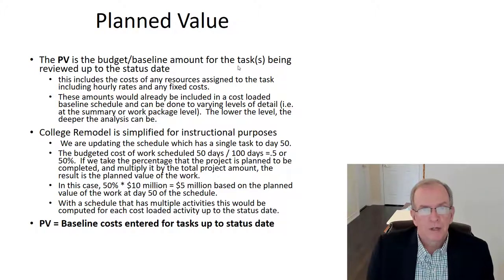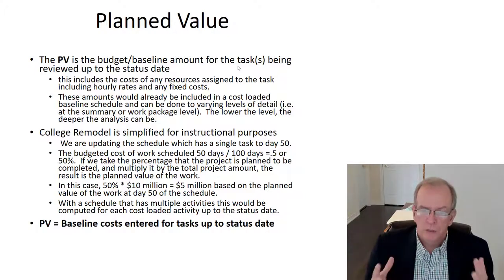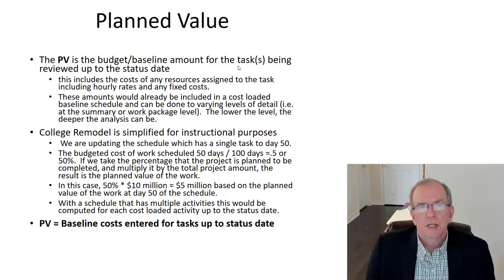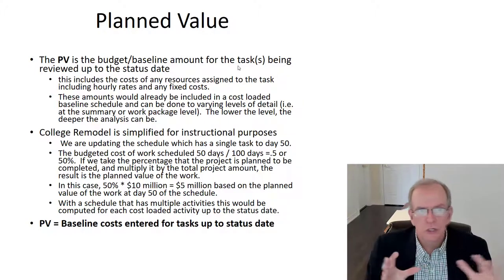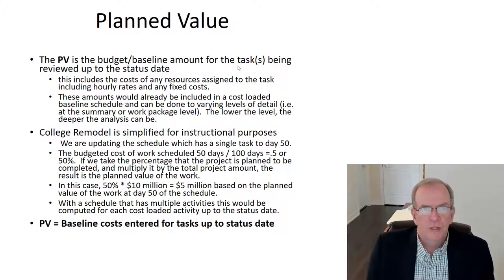Very often it is a contract requirement. And as I said in the previous video, you'll typically find these types of projects when you're looking at infrastructure projects or heavy industrial projects. It's the norm. If you're looking at commercial projects and residential projects, it is not the norm. So there's that difference in where construction uses it. If you're in low-rise residential, you're not going to be seeing this. If you are building transportation systems or hydroelectric dams, you're going to see this.